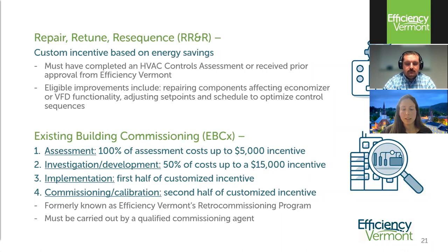And then moving on to existing building commissioning, or EBCX, we used to refer to that as our retro commissioning program. Springfield Hospital's project actually roughly followed that EBCX process, just for reference. The first step is the controls assessment that we talked about on the last slide. And that must be conducted by a qualified commissioning agent if you're doing an EBCX project.